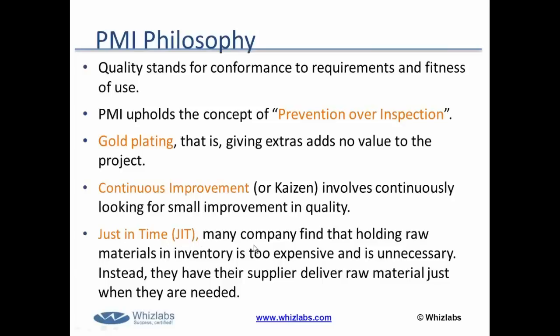Just in time. Many companies find that holding raw material in inventory is too expensive. That means it is very difficult to hold raw material, or the bench strength of people, like in a software company. Earlier they used to keep lots of bench strength to support the customer. But bench strength is also a cost to a company. So whenever you require additional resources, you ensure that only at that point of time you hire or get that material collected or gathered for the project. Just in time basically means whenever it is required, to save cost.